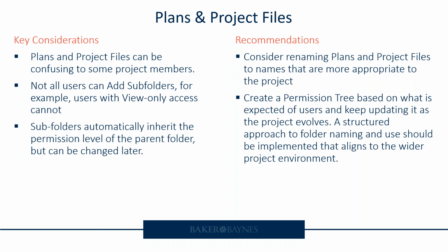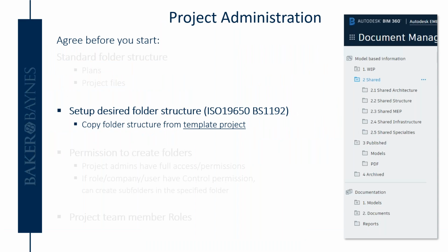So if you have your list of project members that you need to add, you can also have an idea of, what is this person's role? So it becomes easier for you to firstly assign roles and assign associated permissions to those roles. If you have that agreed before you start, that means that you will have fewer tasks of changing things as the project goes on.